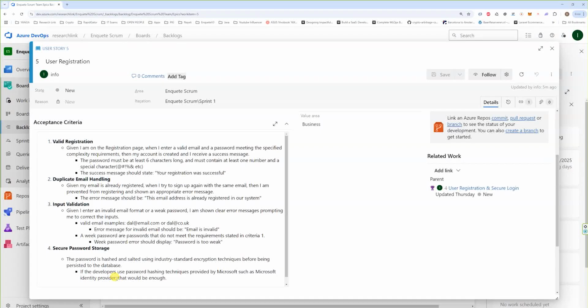Now, you could also have been in a refinement and overlooked something. If you overlook something, or you didn't see it, or you didn't think about it, it's no problem. Just make sure that during the sprint, before you pick it up, you go back to the analyst and say, okay, what error messages should we see? The analyst is like, oh, I didn't specify that. I'm going to specify it now. Then when he tells you, let him go and edit the user story.